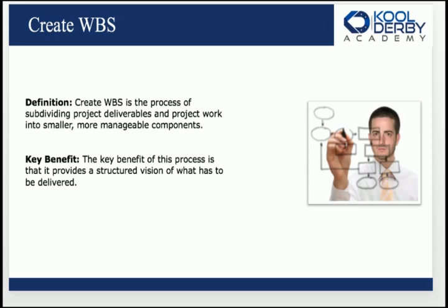So create WBS, create work breakdown structure. The definition: create WBS is the process of subdividing project deliverables and project work into smaller, more manageable components. Key word here is subdivide. When I see subdivide on the exam, I know they're talking about the WBS. So be ready for that. Create WBS deals with subdividing the components until the point where they are more manageable.